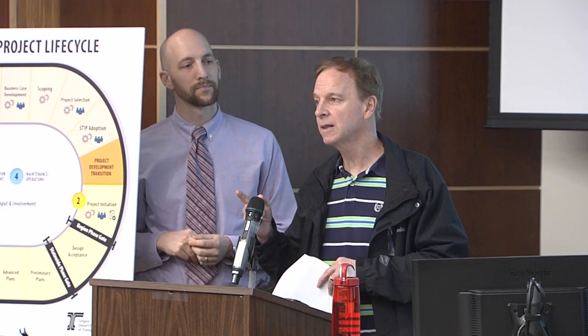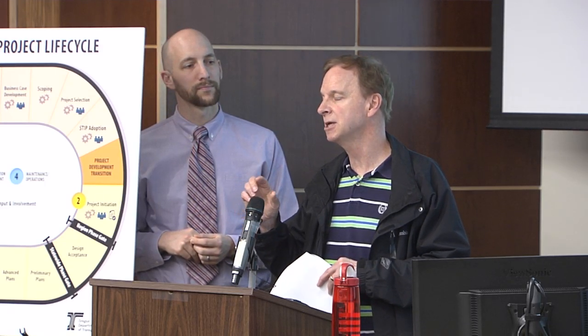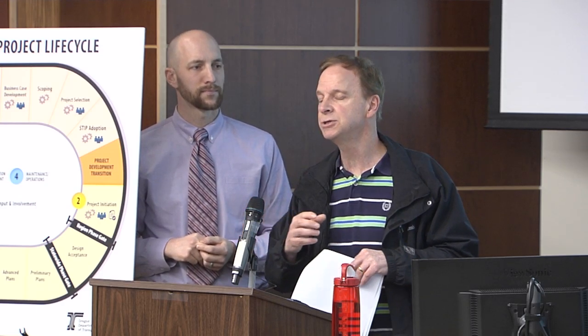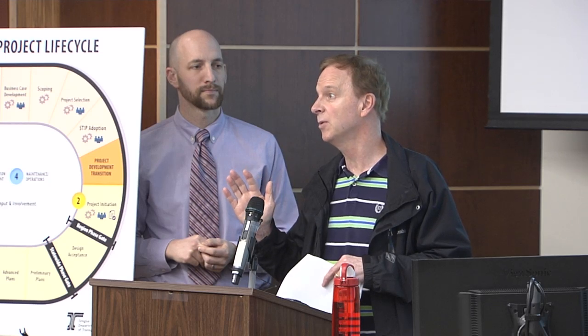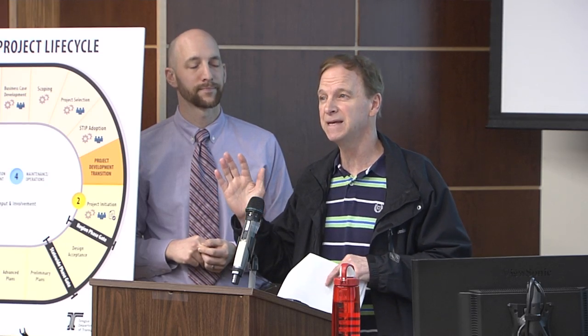We've got a feedback loop this cycle, and each region has a business case gatekeeper. I happen to be that one for Region 2, but we go back to the program fund manager and we say, here's what the scoping team came up with. Are you okay with this? Because they may say, I'm not going to fund it, but I agree with what their solution is.